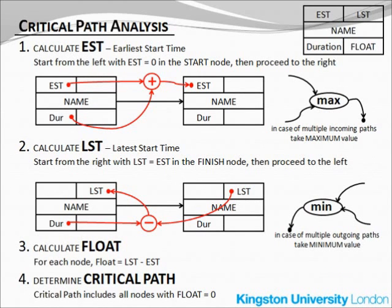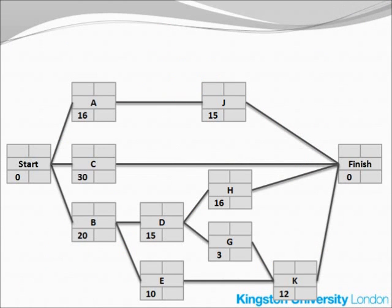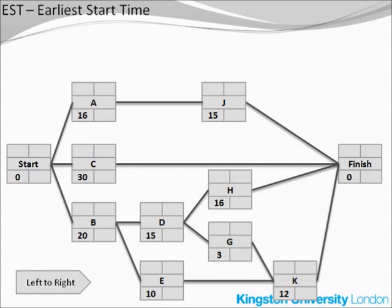This slide is a recipe for all the remaining calculations we have to do. We will calculate the earliest start time, the latest start time, the float, and then we will determine the critical path. Back to the activity network, we will now calculate the earliest start time, or EST, for each activity. This calculation starts with the start node, goes from left to right, and finishes with the finish node. The EST is normally shown in the upper left-hand corner of each activity box. With the start node, the EST — the earliest start time — is always zero.